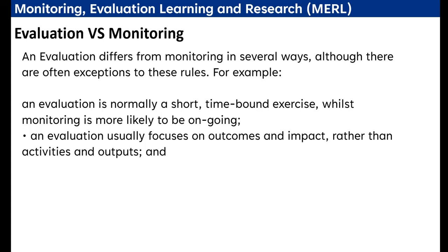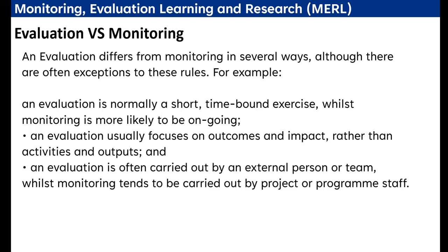An evaluation usually focuses on outcome and impact. When you are conducting evaluation, you are focused on the outcomes and the desired objective rather than activities and outputs, because in monitoring you focus on activities and outputs. Training is conducted or not, how many participants have been trained, whether they have been trained according to the target. So that is monitoring. Now evaluation, if you are conducting a training, you would like to see what is the impact of the training on the participants or on their role, on their organization.